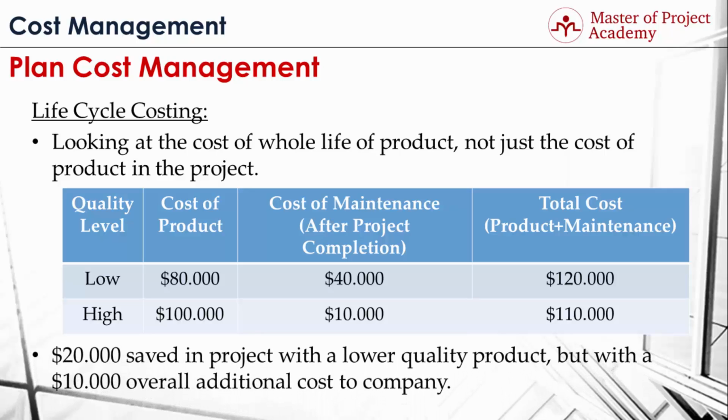Now, if you consider only project costs, buying low-quality pressing machine is more feasible. But your company plans to use it in future projects. Therefore, lifecycle cost must be considered and high-quality pressing machine must be purchased.